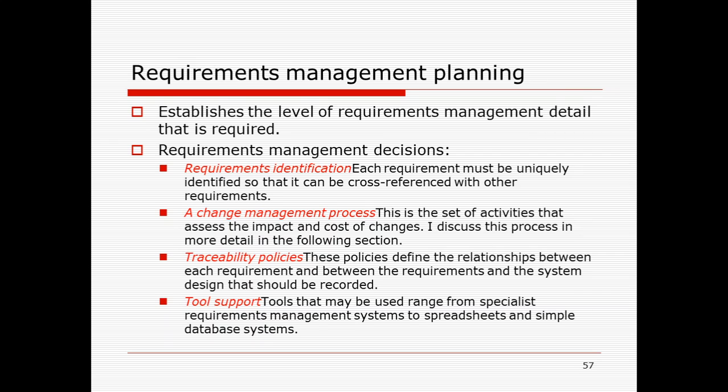After that, a change management process. Now, what is the change management process here? This is the set of activities that assesses the impact and the cost of changes, that is, to identify what cost will be involved while changing the requirement. So that impact has to be analyzed. That is the change management process.